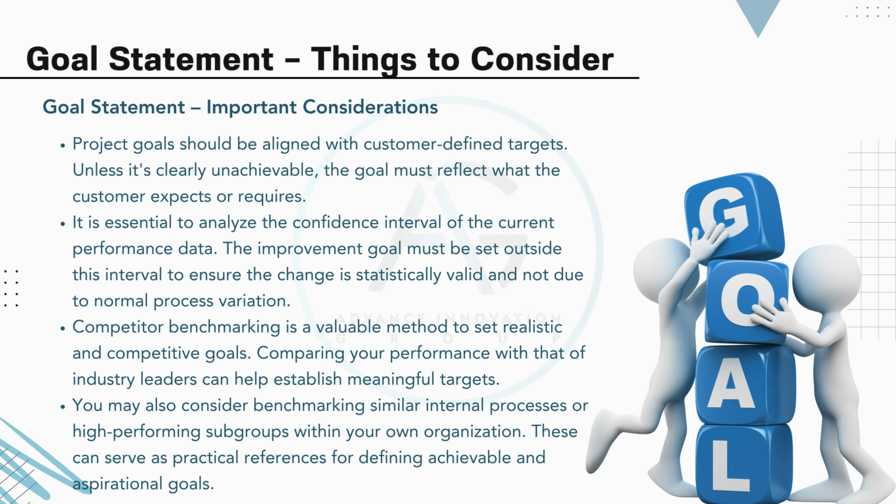Confidence interval of current data. Before setting a target, analyze the confidence interval of your baseline data. Set the goal outside this interval to make sure the improvement is statistically significant and not due to random variation.